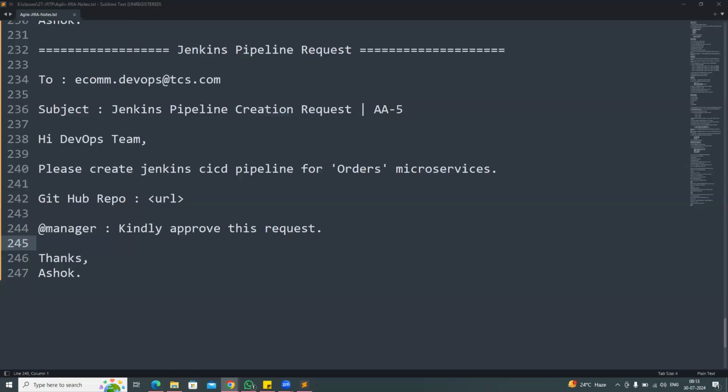So they have given 3 days of time to complete your story, but actually it is taking more than 3 days of time. Then you can tell the Scrum Master, I'm working on the story number 422. This story is targeted for 3 days, but actually it is taking more than 3 days. What is the reason? You need to update that in the Scrum call. Why is it taking more time? What is the actual reason? You need to justify that. If you need more time, then you need to justify that.